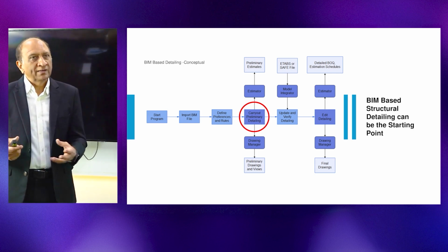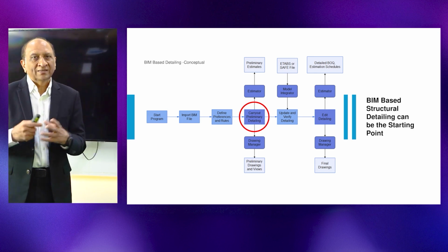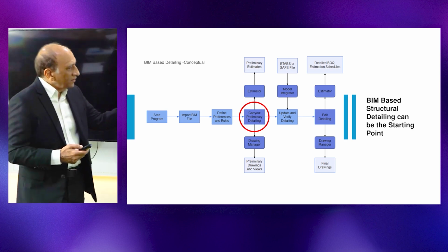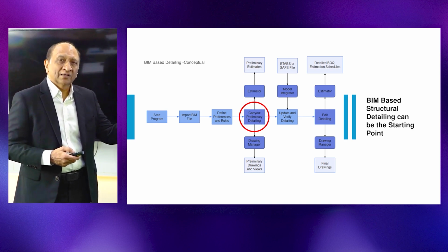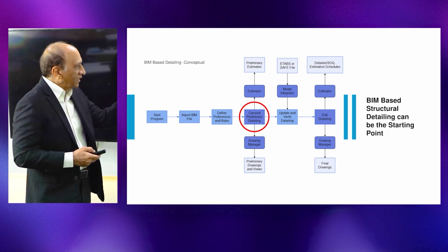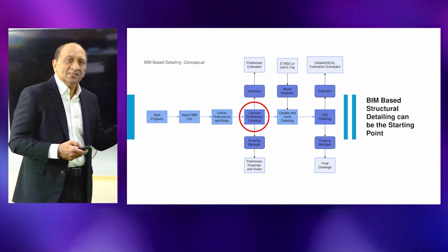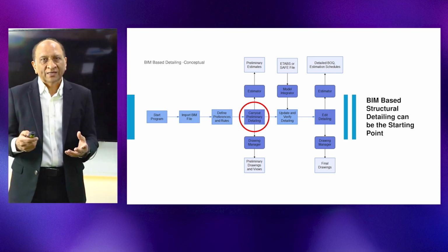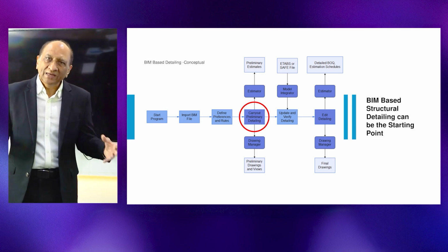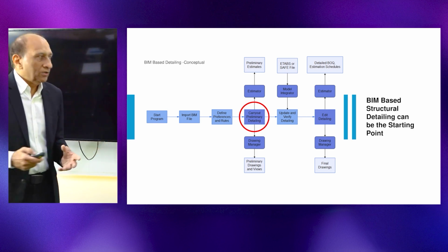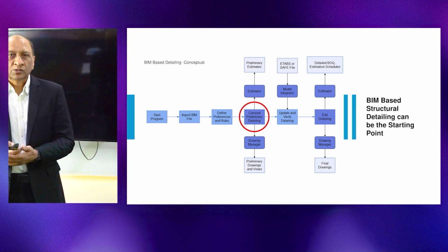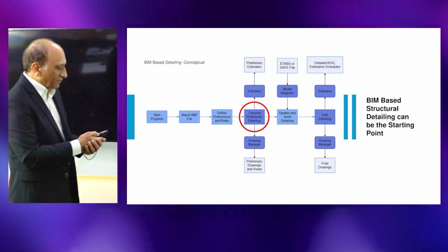So if the typical reinforcement, most common reinforcement, code-based reinforcement, detailing requirements, all the basic rules and experience can do that, then we already have a kind of working model on which to start the next steps. And we can go on to estimate the preliminary cost estimates. This is actually done in many offices. They already have practices and previous experience. They can prepare many things based on that. But it doesn't really fit into the BIM workflow yet, because this information hasn't been put by structural engineers into the system. It is just assumed based on some parameters that they might have in spirit.